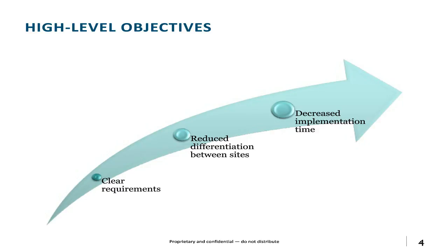Now, this is something that needs to be communicated because there's sometimes a lot of resistance to upfront planning in terms of workflow analysis and harmonization. The reason being is that when people are sitting on keyboards and developing functionality and those kinds of things, they're viewed as being productive. And the truth of the matter is a little bit of upfront planning will reduce that implementation time. So planning up front will actually decrease implementation time, but sometimes it's a little bit of a harder sell.